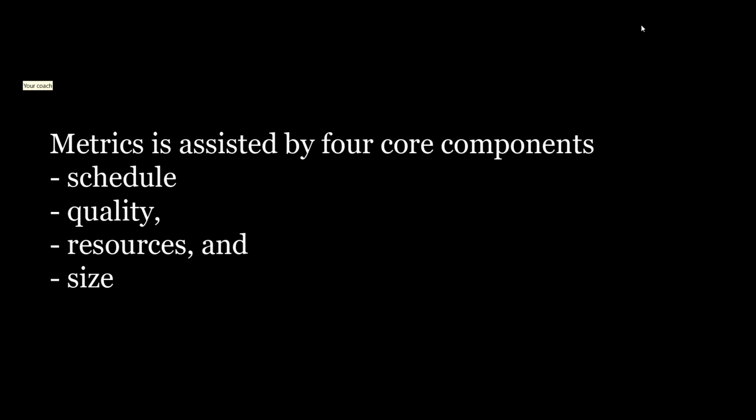Meaning add more programmers, for example, if one task requires 2 weeks, you put two programmers, then you can get the task done in 1 week. That's what they thought. More resources, faster delivery. Well, it doesn't happen that way, right? Not all the time. In fact, very rarely.